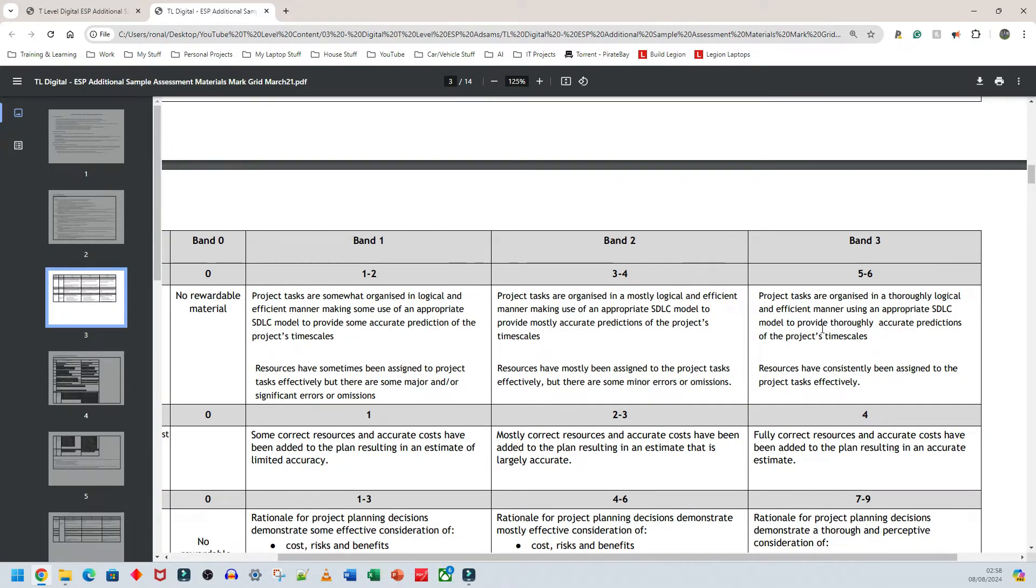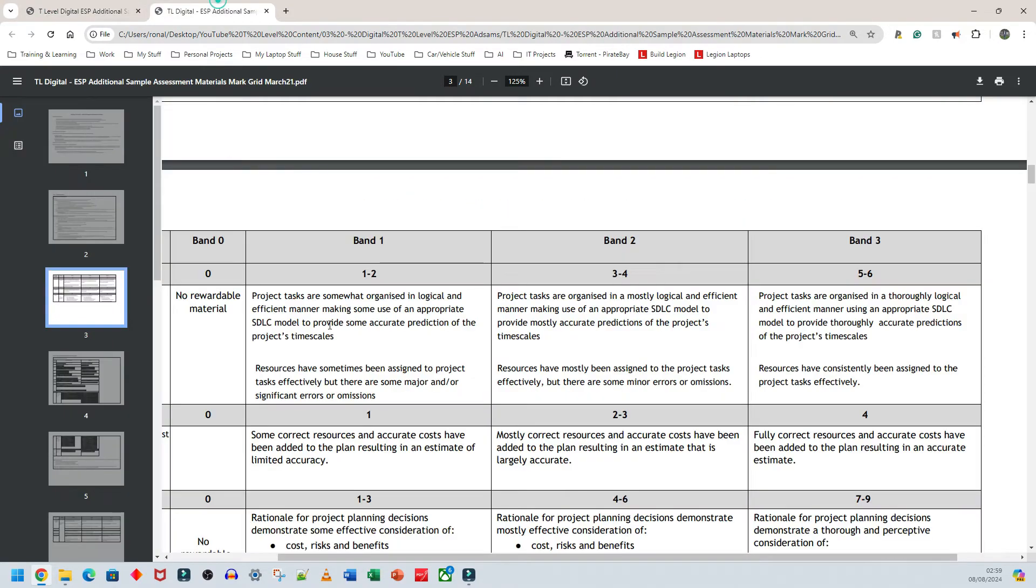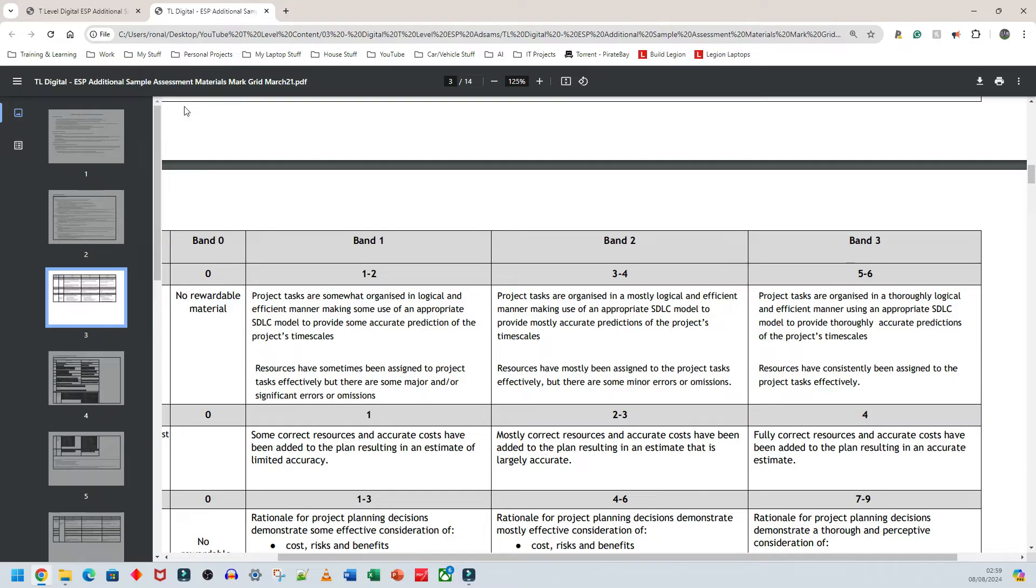Logical is more or less a waterfall type system where one task simply comes after another and they keep going like that for the entirety of the project. Efficient is going to be where you have multiple tasks running at once because you have, I'm going to say five people. They all have different skills. I could have my cloud architect working alongside my network engineers.